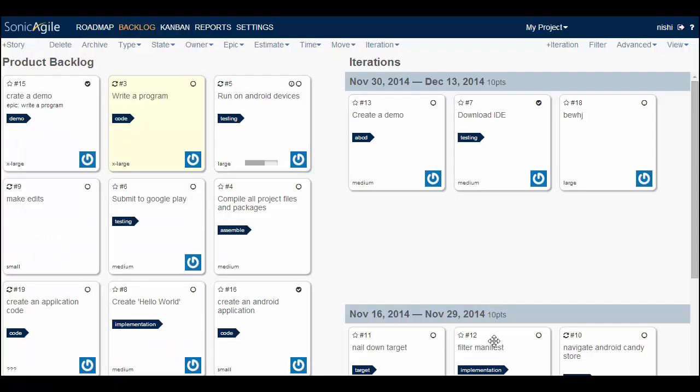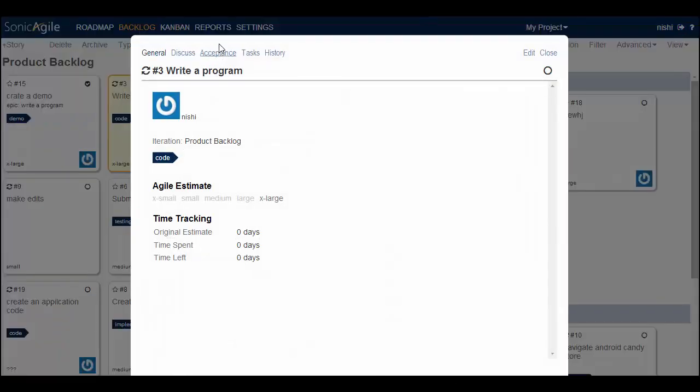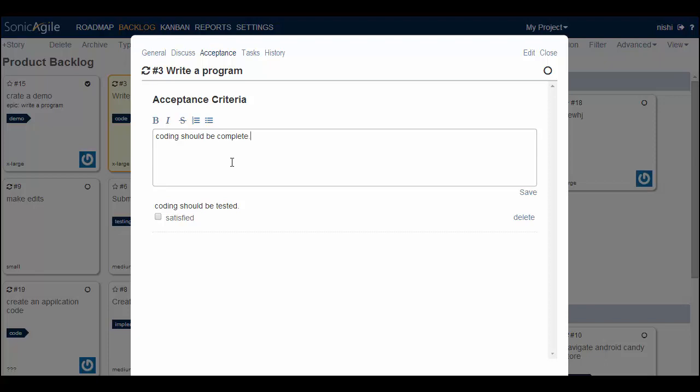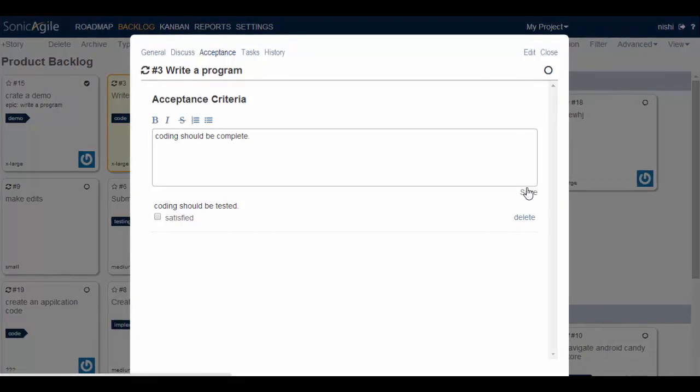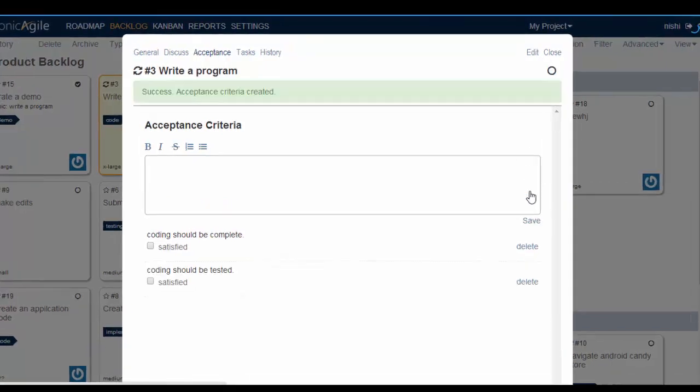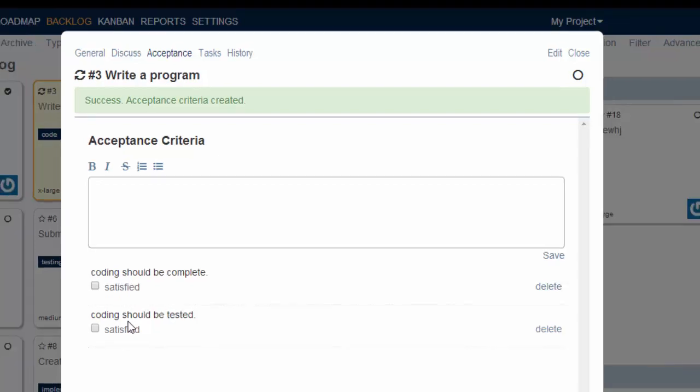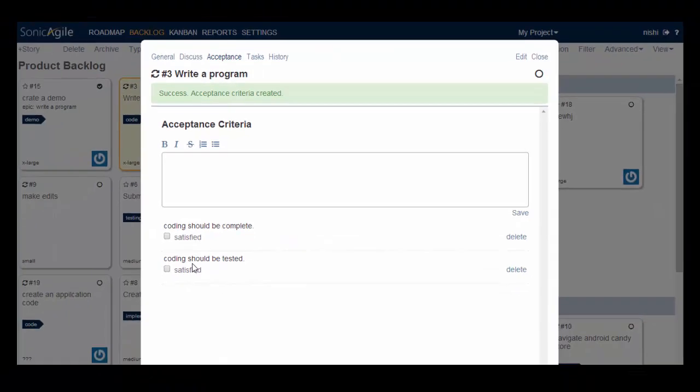I will show you with an example how to create an acceptance criteria for a particular story. Go to your story, double click on it, then go to acceptance and you can write any of the acceptance criteria, for example, coding should be complete and then save it. So I can create a checklist of the requirements for any particular story. So that way I can make sure that I satisfy all of the critical requirements to get the story done.